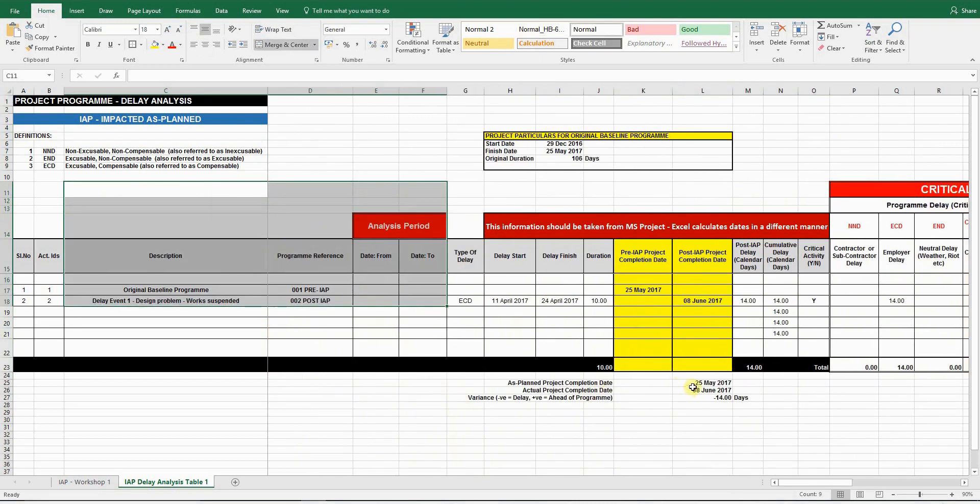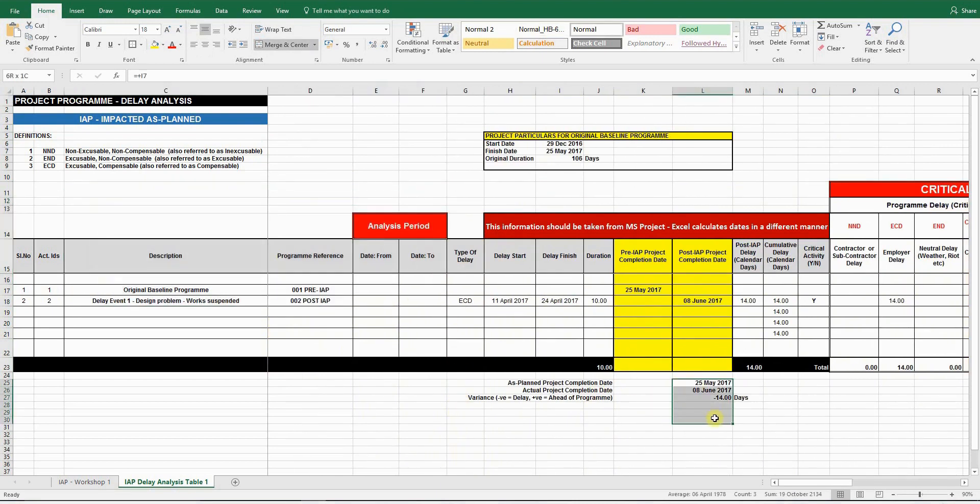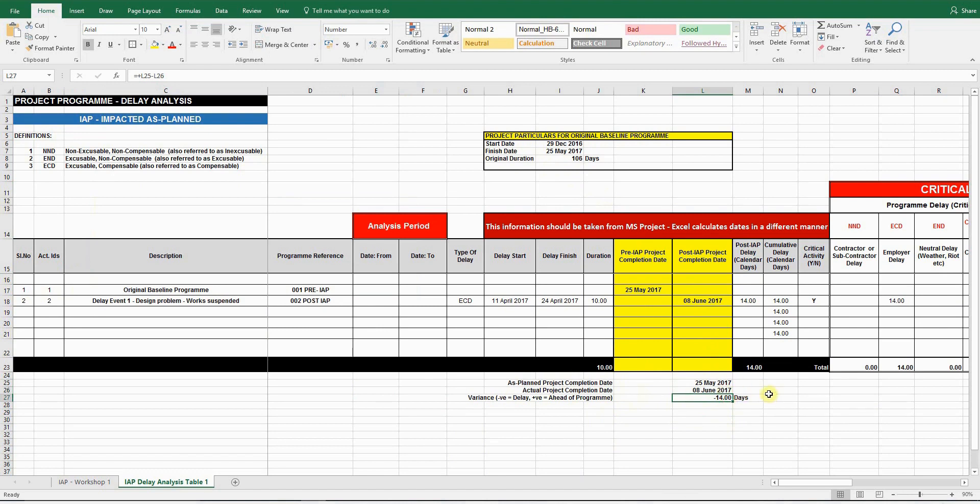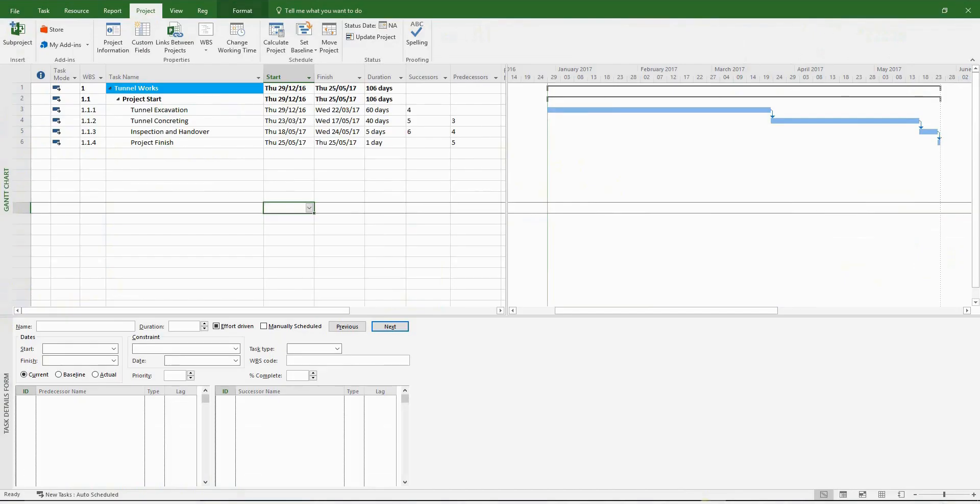And the overall conclusion is at the bottom here, where you have the as planned project completion date and the estimated project completion date, giving you an overall delay to the project in calendar days. Now let's go back to MS Project and carry out an as planned impact analysis.